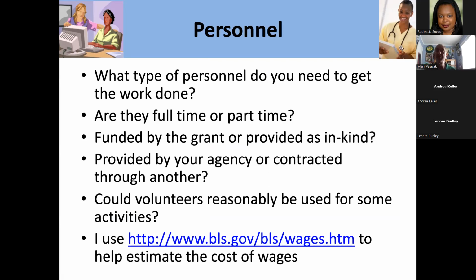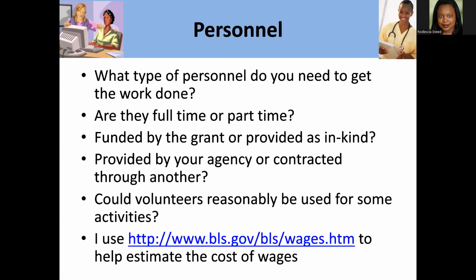project. What's important to understand is that some of the grant funders, a good example is the Federal Department of Housing and Urban Development, will require an in-kind match of a certain percentage. So you may have to think about, do we have resources that we can contribute to this project where we already have these funded resources or commitments from other agencies that can cover our in-kind match? And I'll talk a bit more about that a little later in the presentation. But it's an important factor to understand.